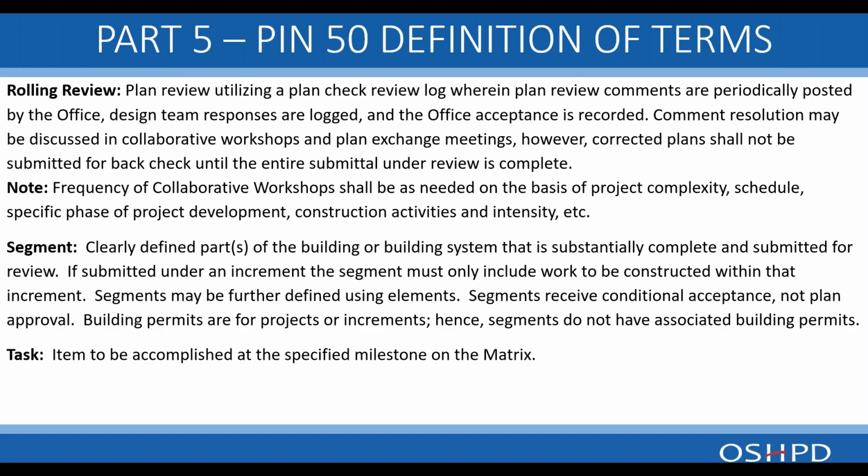If submitted under an increment, the segment must only include work to be constructed within that increment. Segments may be further defined using elements. Segments receive conditional acceptance, not plan approval. Building permits are for projects or increments, hence segments do not have associated building permits.